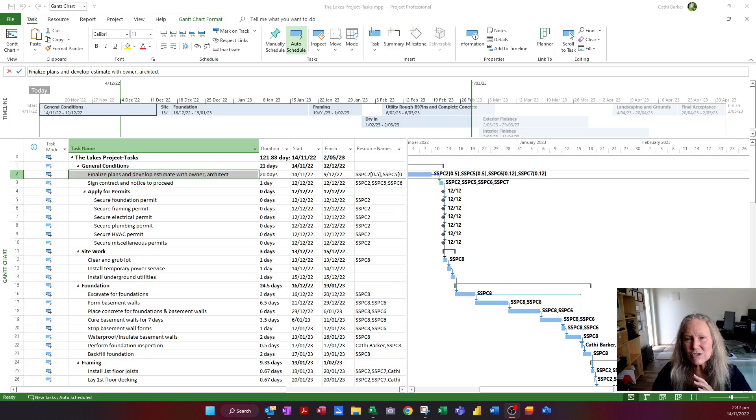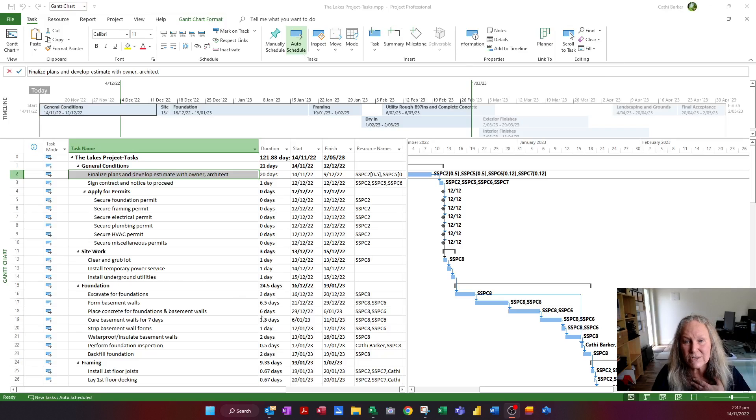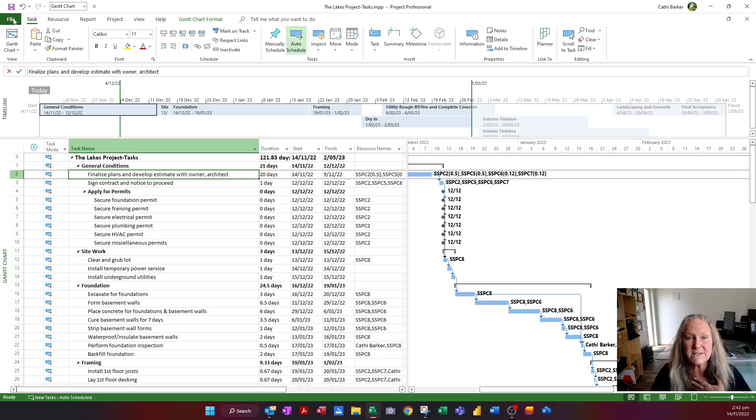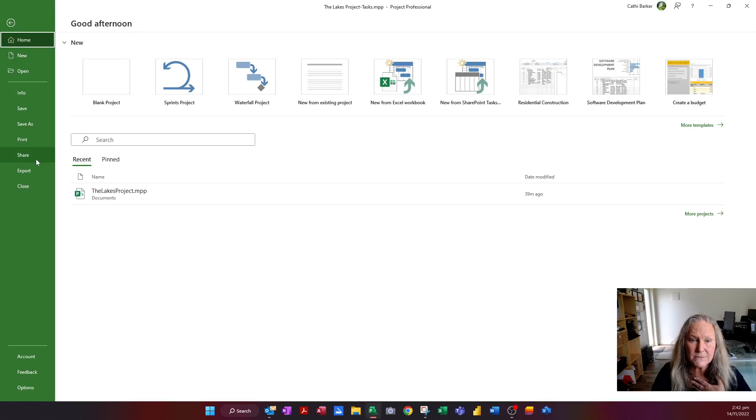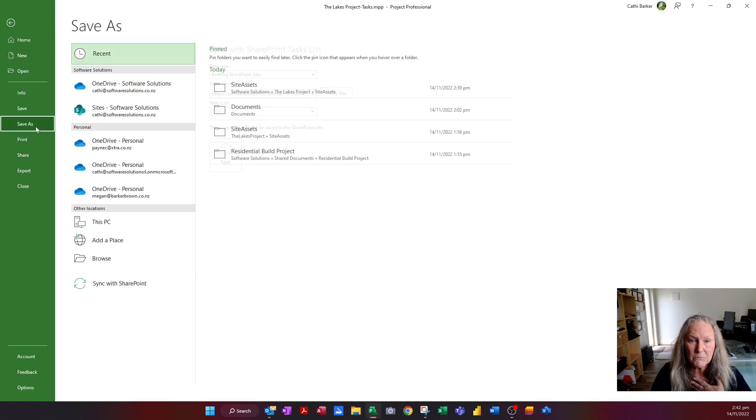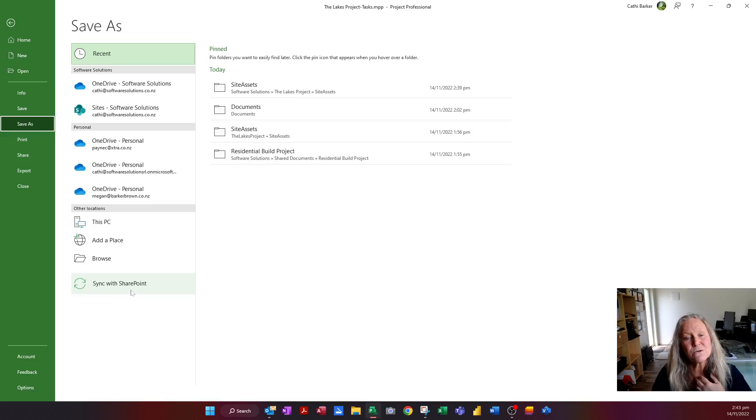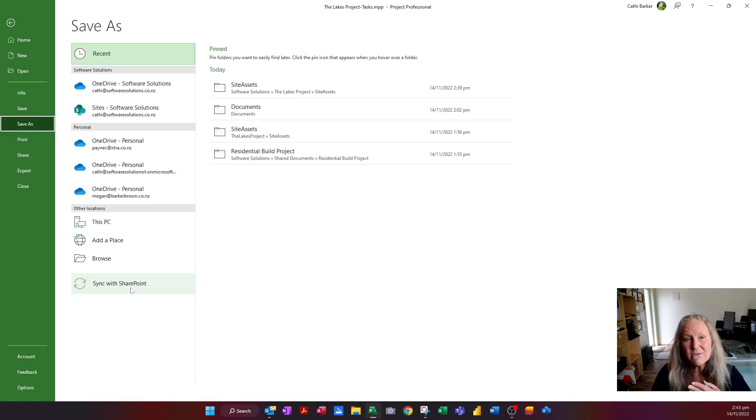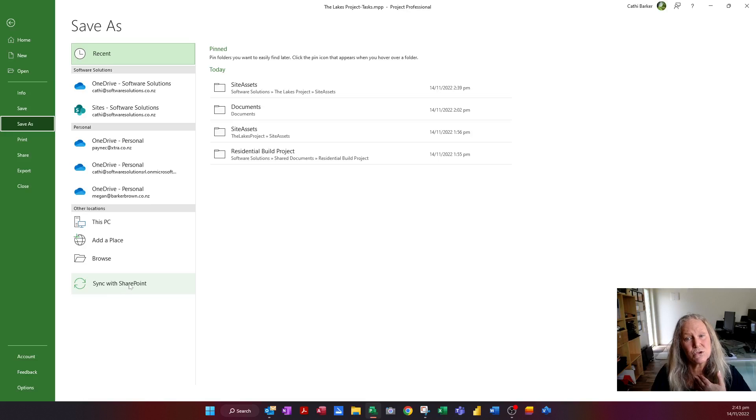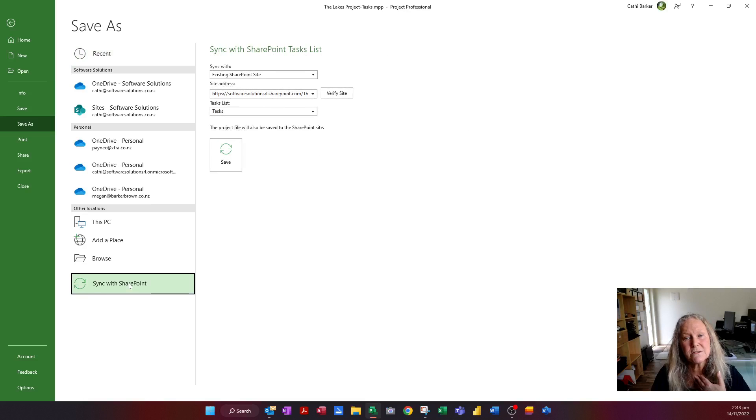So how do we share this project plan using SharePoint? Well, we go to File and we go to Save As. And why we do that is we can see this option down here. If you have SharePoint, you'll have this option to sync with SharePoint. So I'm going to click this option.